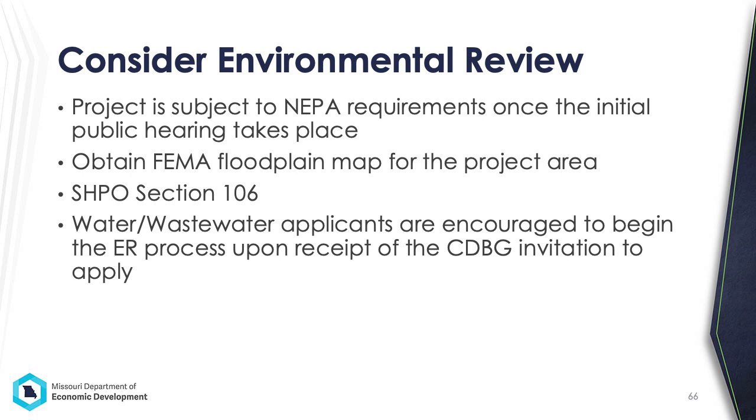We now consider the environmental review. Every project is subject to National Environmental Policy Act requirements once that initial application public hearing takes place. Please obtain a FEMA floodplain map showing the project area. After obtaining that map, please contact our environmental review team if the project lies in a floodplain or floodway, as there are additional restrictions on activities in those areas.